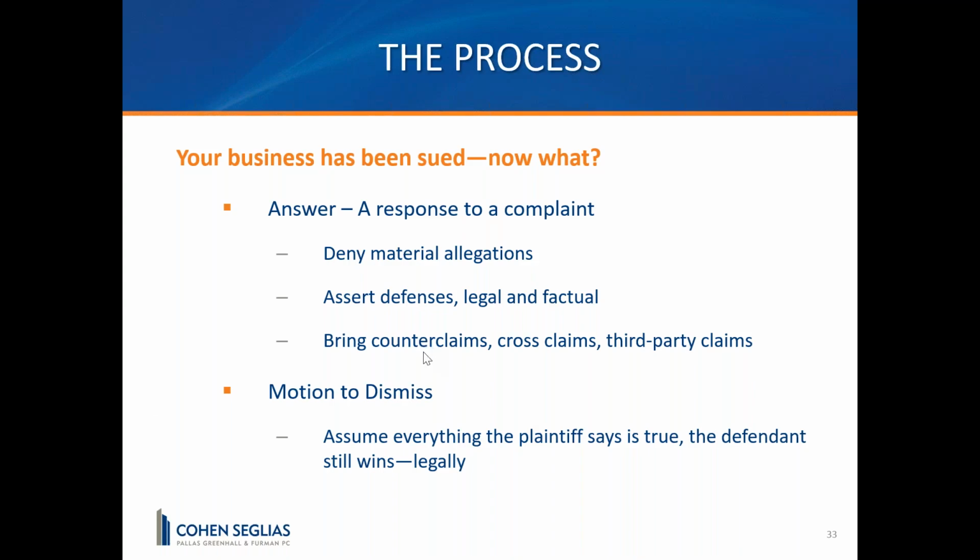Again, unlike arbitration, as John mentioned, it's very rare to have any pre-arbitration motions. Instead of answering a complaint in litigation, you have the option of filing a motion to dismiss, or in the case of Pennsylvania, they're called preliminary objections. And basically, you're taking a look at everything that's pled on the face of the complaint, and the defendant is arguing that the law basically says that regardless of what's pled, I'm still going to prevail. I have to tell you that it's a rarity actually to see a court dismiss a case at the very beginning stages, because there's oftentimes many facts in dispute that need to be explored during discovery.